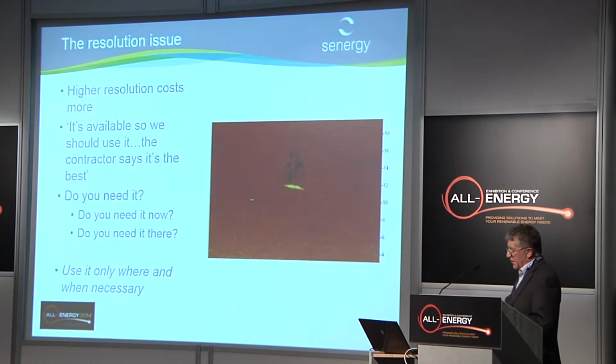So the question is, high resolution. Well, it's available. It's the newest thing. Let's use it. The contractor says it's the best. Well, the contractor has a particular reason for telling you that, because it means you'll have to shoot more lines of data and it will give him a bigger revenue project. Now, I'm maybe exaggerating that, but that's a fact of life. Do you really need all that resolution, or do you really need it at that location? You should use it where and when it's necessary.